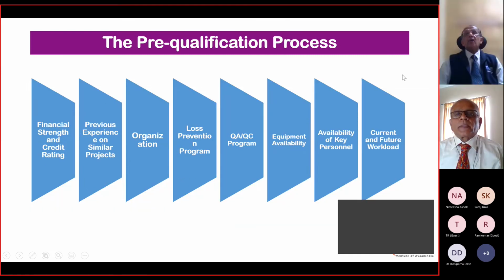Right. This is the pre-qualification process. Now in the pre-qualification process, the general practice in olden days was you have to submit in hard copy the entire set of documents. Thank God that we have technology now. You can do all the pre-qualification process entirely using technology, and it's easy for the company as well. It can be archived. Now as per rules, which can differ from country to country, the archived documents have to be kept in certain countries for a minimum period of 5 years, because they are all subject to audit.